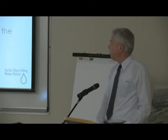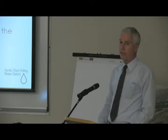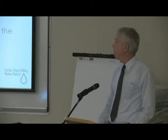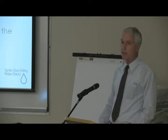So getting into a big project like this, ultimately this project's going to cost more than $150 million to plan, design, and construct. One of the big issues or constraints with our design and our construction is that we have to keep the plant running the whole time that we're doing the work.